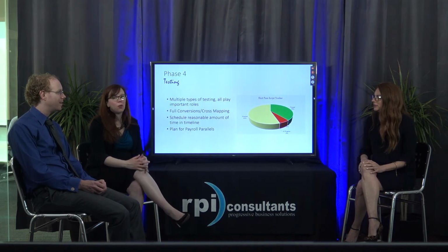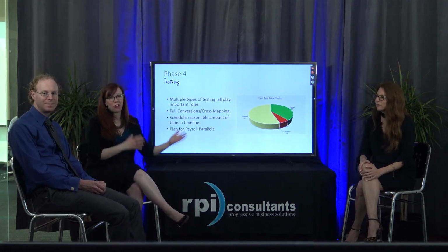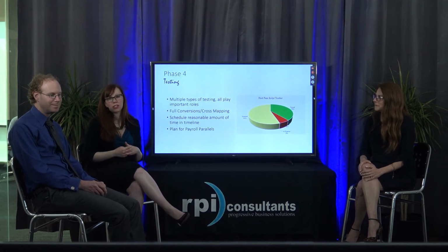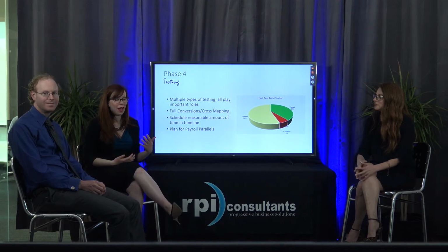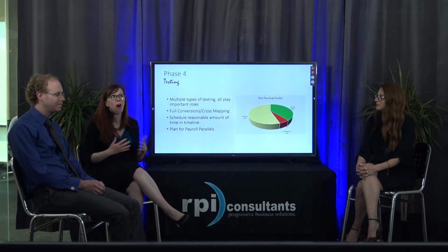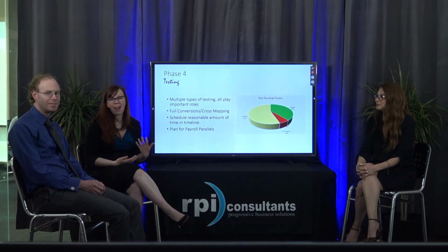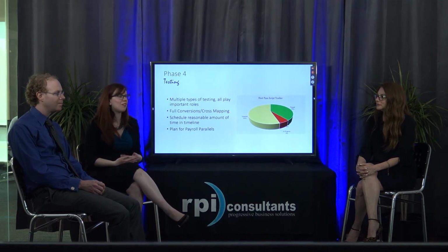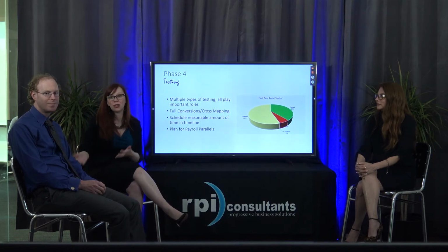Do you want to talk about any of your experiences with the testing? I think we've been part of really great testing, and we've been part of projects where testing is problematic. One of the things that clients often find hard to believe is how long some of these testing periods are. We generally look at a full 3 weeks of dedicated testing for both our system integrated testing and our user acceptance testing.